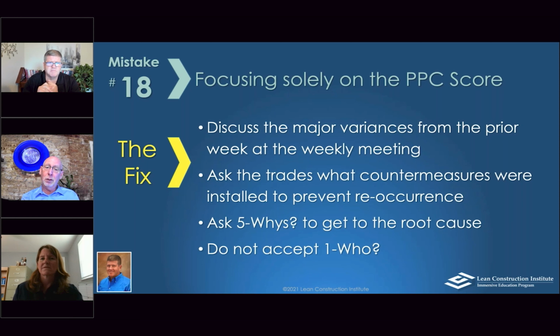What are the phases? I would say that I hesitated to jump in earlier when a lot of this conversation was taking place. Remember the note that was given early on, I think it was one of Dave's original notes, which is understand the critical handoffs when looking for phases in places where work transitions from one hand to another. That's one key look at this. But another key look at this is, and David's comments make me think of this, it's always project specific.